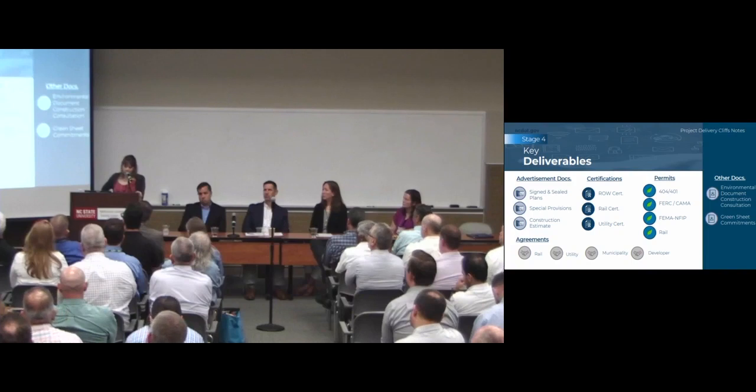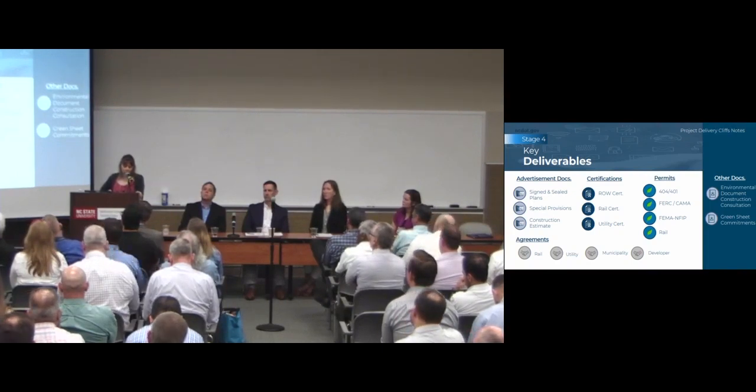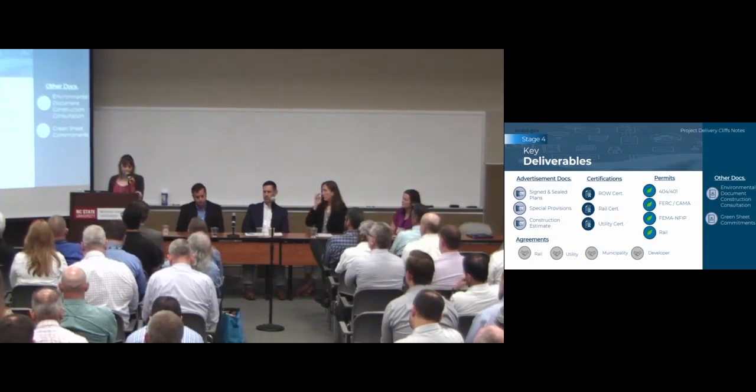We also have some certifications. These must be signed, and they're needed to ensure construction funding and for that funding to be authorized. These should be stored as key documents, and they consist of right-of-way and utility certs. The project manager should be coordinating with the right-of-way and utility subject matter experts to make sure they're assigned and included into that folder.